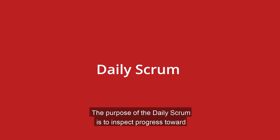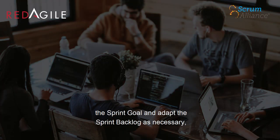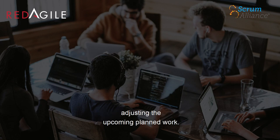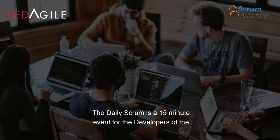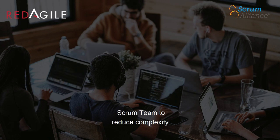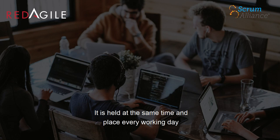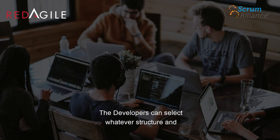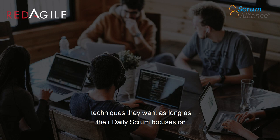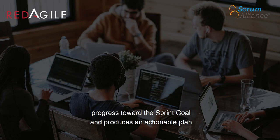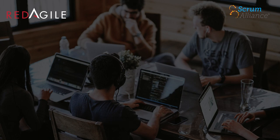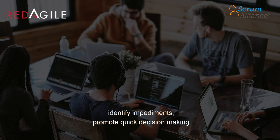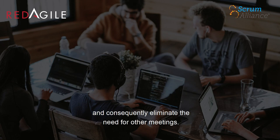Daily Scrum. The purpose of the Daily Scrum is to inspect progress toward the Sprint goal and adapt the Sprint backlog as necessary, adjusting the upcoming planned work. The Daily Scrum is a 15-minute event for the developers of the Scrum team. To reduce complexity, it is held at the same time and place every working day of the Sprint. If the Product Owner or Scrum Master are actively working on items in the Sprint backlog, they participate as developers. The developers can select whatever structure and techniques they want, as long as their Daily Scrum focuses on progress toward the Sprint goal and produces an actionable plan for the next day of work. Daily Scrums improve communications, identify impediments, promote quick decision making and consequently eliminate the need for other meetings.